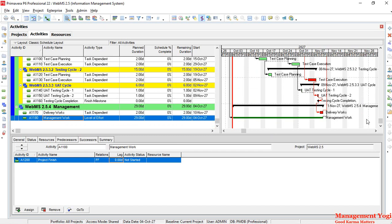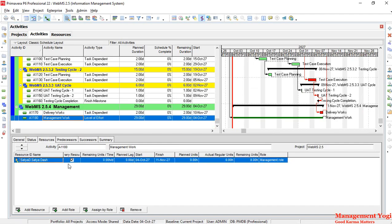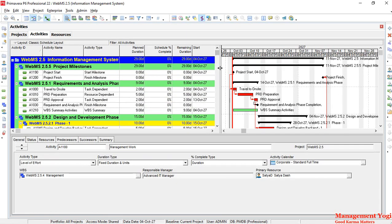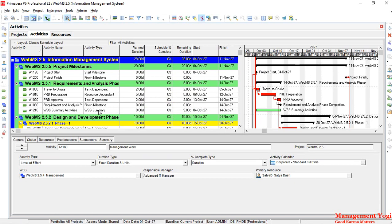The level of effort duration is determined by the predecessor and successor start dates. It looks and behaves like a hammock activity, but it is not exactly a hammock activity. Unlike a hammock, for the level of effort activity you can assign resources — any number of resources can be assigned.